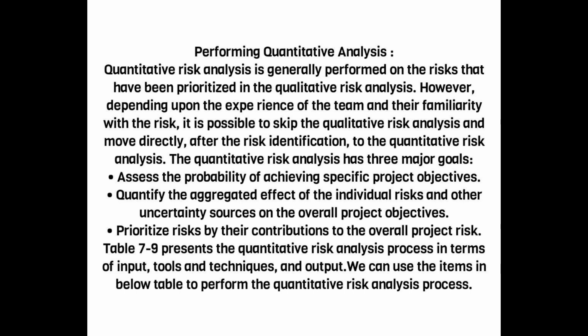Quantitative risk analysis is generally performed on the risks that have been prioritized in the qualitative risk analysis. However, depending upon the experience of the team and their familiarity with the risk, it is possible to skip the qualitative risk analysis and move directly, after the risk identification, to the quantitative risk analysis.